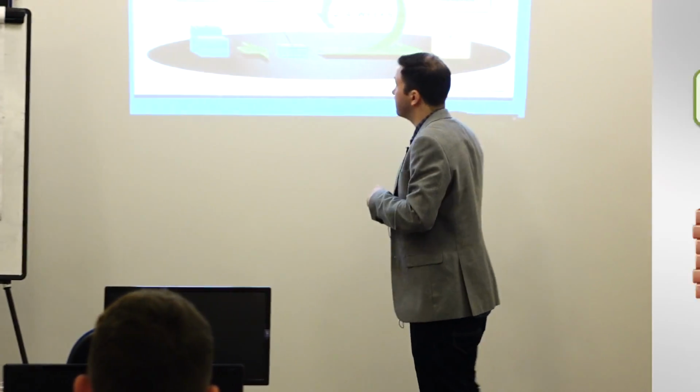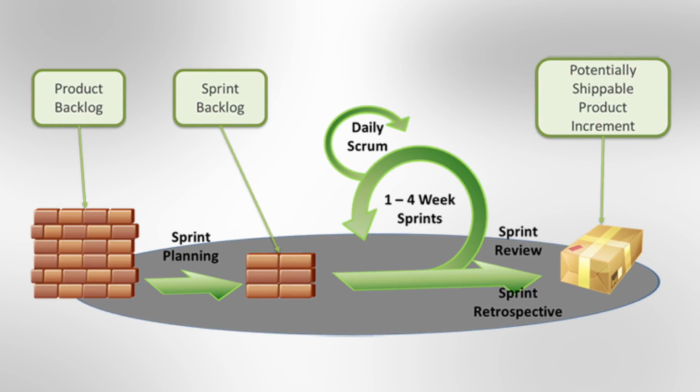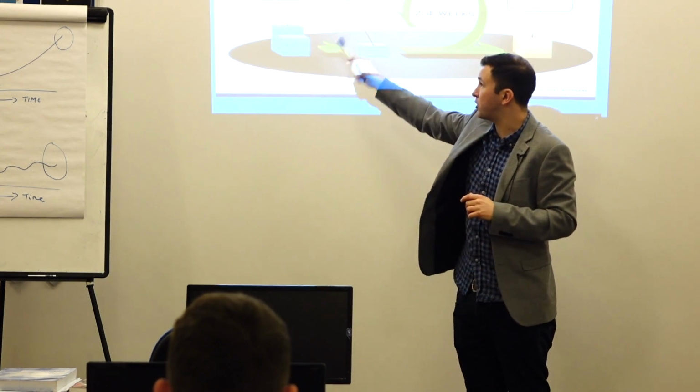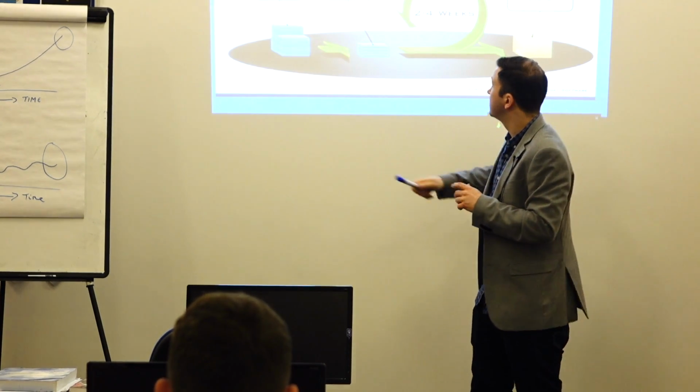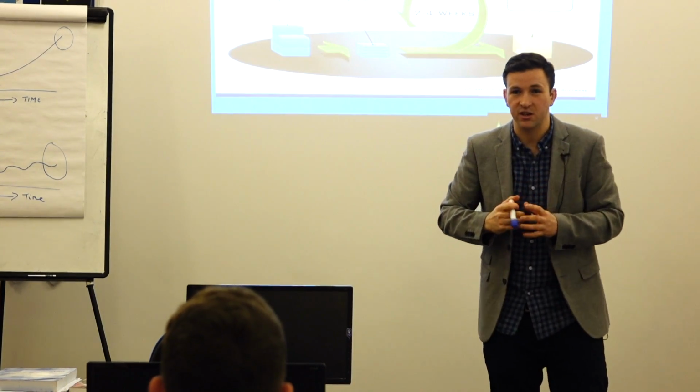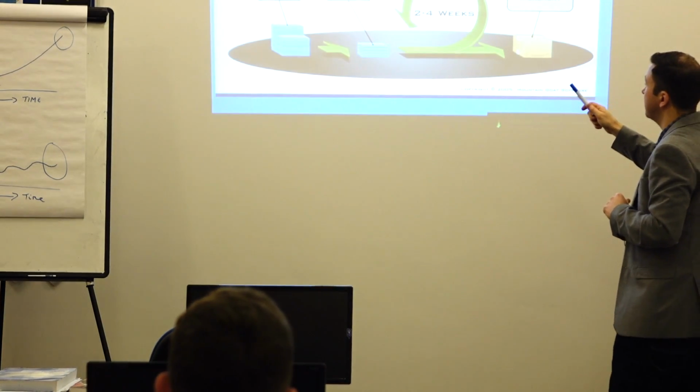And so kind of the key components of this is what I spoke about, the product backlog. Each sprint, we take a few features out of the product backlog, maybe say 2 to 5 features. And then what we look to do is break them down into individual tasks ready for this sprint. So we move from the product backlog, so the overall feature, to the backlog for just this sprint, so just these items.